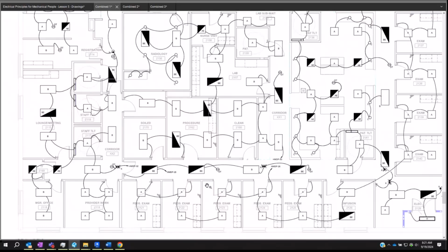Now, yes, I have actually done this: I know this manufacturer, the client wants this manufacturer, but since they're a public entity, they have to have 3. I'm going to design it according to this proprietary information. Note that acceptable alternative designs are allowed, and the contractor shall submit during bidding.